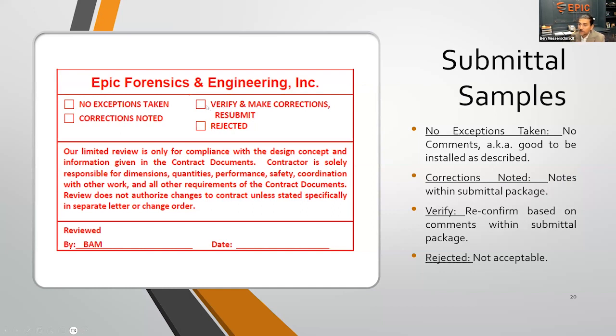There are scenarios where value engineering may come up where the contractor wants to submit a different product for whatever reason. In the height of COVID, it could be any sort of availability issues. Any massive lead time, let's say on roof underlayment, which I know at one point was operating at like a year lead time, or some basic sealants as well, and we'll contractually as well talk about the price of plywood.